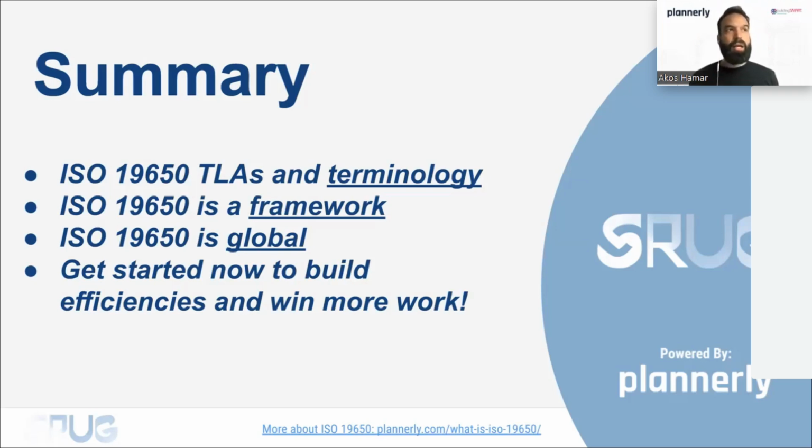Absolutely right. There is not even an agreement on what LOD means. Is it a level of detail, level of development, a level of definition? In some cases, LOD is a combination of pretty much everything, a geometrical requirement and information all in one. In some cases, it's really regional or company specific how everyone wants to understand it. In other cases, LOD is only the detail of the geometry, and we start introducing LOI and LOA for information requirements and accuracy.